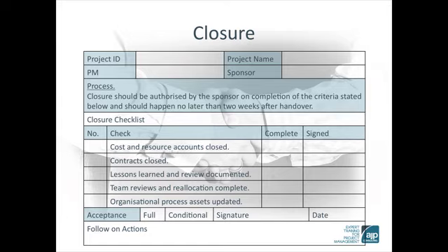Why do you think it is that most projects are not formally closed? Well, it's either because the scope has changed and therefore completion cannot be demonstrated, because the project manager is reassigned, or because insufficient time and resources were allocated to completing it. The clearest response to all these issues is early identification and early planning for handover and closure from the initiation stage onwards.